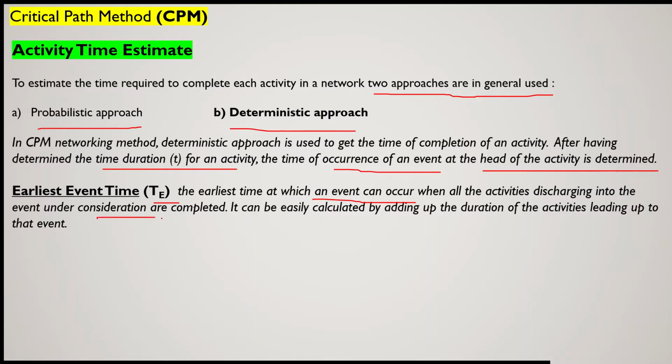You are aware that an event can be said to have occurred only when all the activities discharging into it have been completed. Otherwise, that event has not occurred.